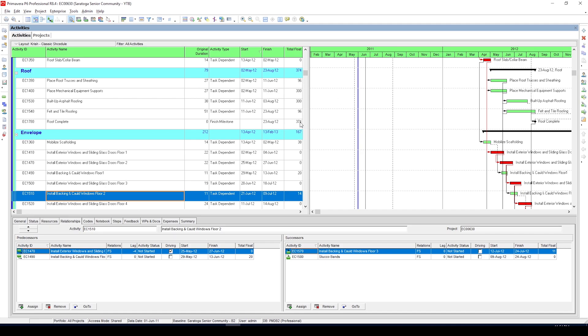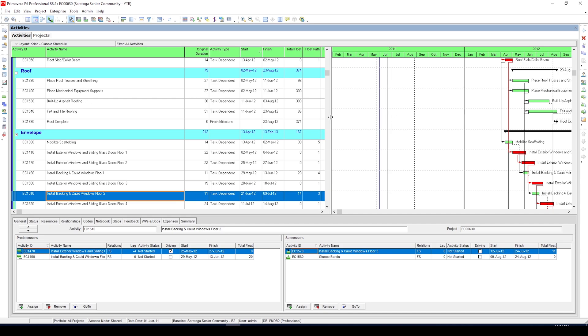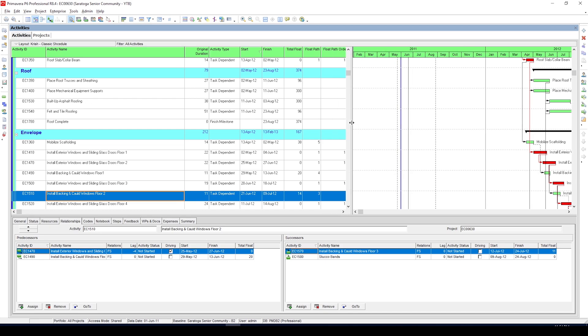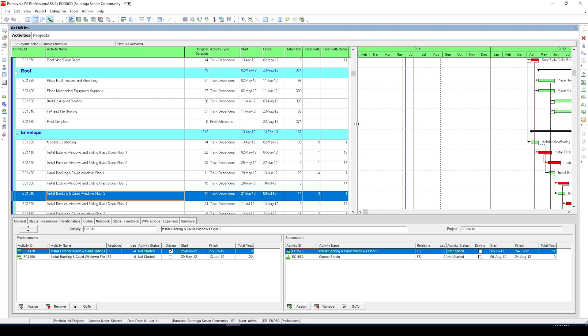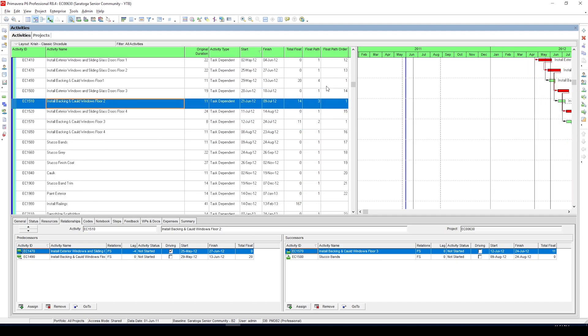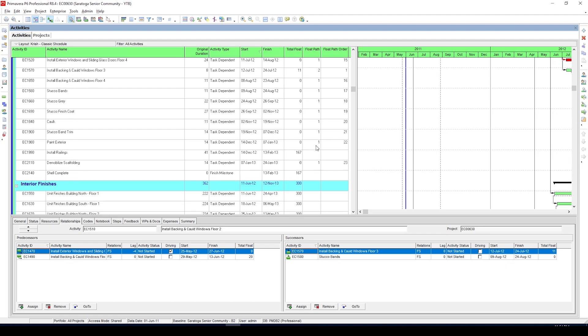Now there are a few more steps before we can get our final output. First step is to add these two columns: float path and float path order. You can see that P6 has categorized activities under different float paths numbered 1 to 5.